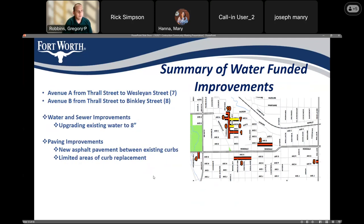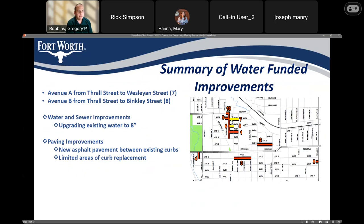We have a couple of streets on this project funded by the water department: Avenue A from Thrall to Wesleyan, and Avenue B from Thrall to Binkley. On these streets, we're upgrading the existing water line to an 8 inch. As far as proposed paving improvements, we'll be replacing the streets with asphalt pavement between the existing curbs and doing some limited curb replacement as well.